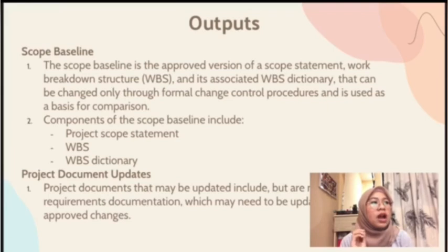Control accounts are placed at selected management points in the WBS. Each control account may include one or more work packages, but each of the work packages should be associated with only one control account. A control account may include one or more planning packages. A planning package is a work breakdown structure component below the control account with known work content but without detailed